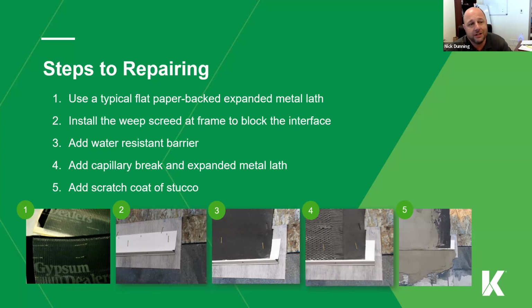You also want to make sure you have a clear scope of work, because sometimes you'll think you have a bad engineer who's not doing things when in reality it's not part of what they've been hired for. So make sure you understand it. Make sure you ask the right questions. Because a lot of times we can add phases, you can do additional services, but if there's not a real understanding of expectations, deliverables, things like that, it's bound to go wrong. And there may be a lot of anger that's really based off a misunderstanding, not somebody doing something wrong.